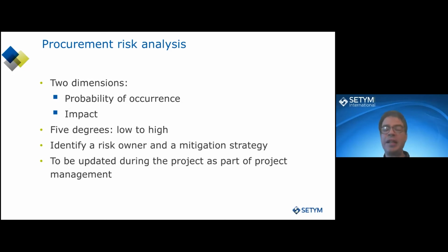So if you said, oh, we have high unemployment in an area where some of the works contracts will be done, you may say our mitigation strategy to avoid problems with the local population is to force the construction firm to use at least 75% of local labor as unskilled labor, for example.